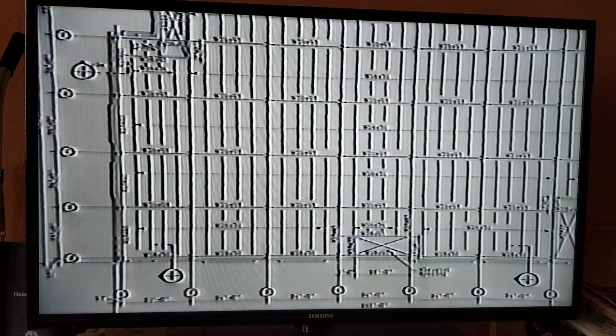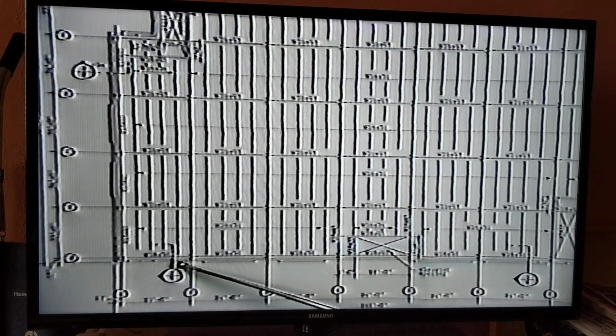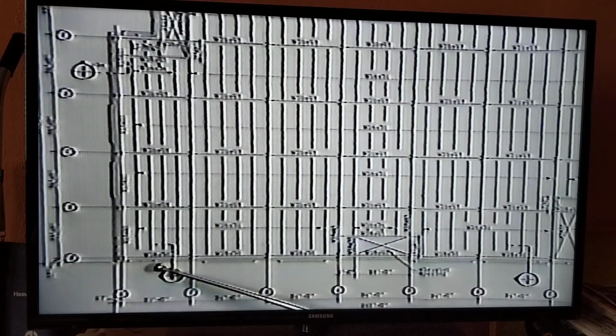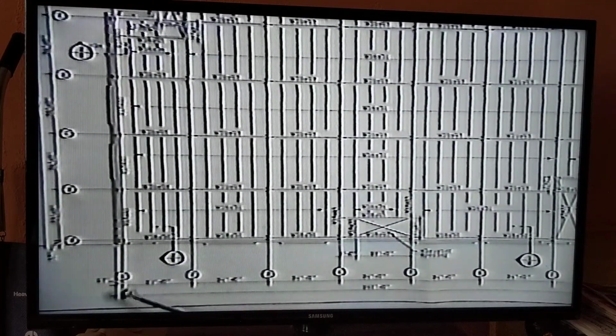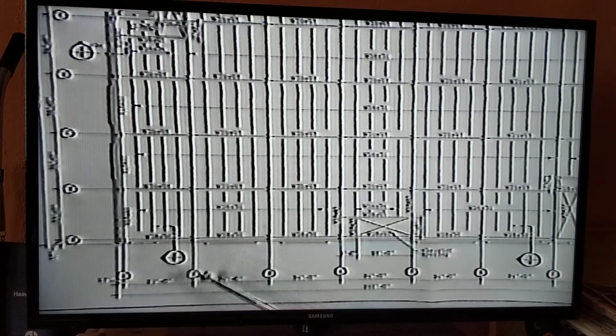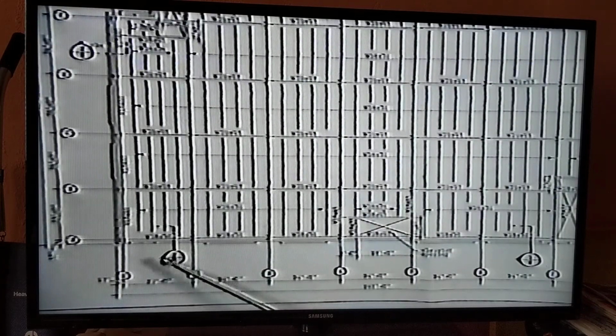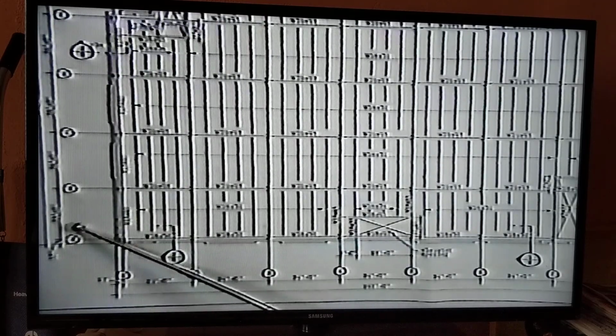As far as the framing plans themselves go, let me call your attention along the piece of steel that is between 1 and 2. You'll notice that this is a W18 by 50 piece of steel. How long is this piece of steel? Well, your eyes at first might deceive you because of this little 12 inches here, but this piece of steel is 23 feet long. The one next to it, an 18 by 50, is 24 feet long. The one that is extending along 1 between A and B is a W18 by 40, and it is 23 feet long.